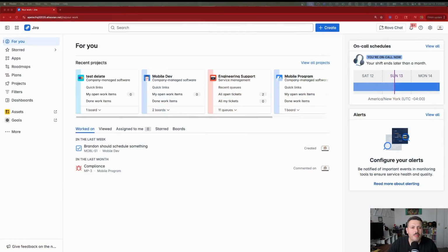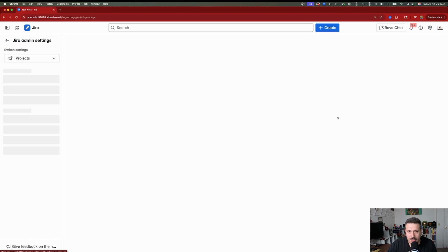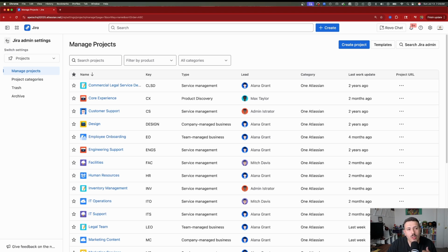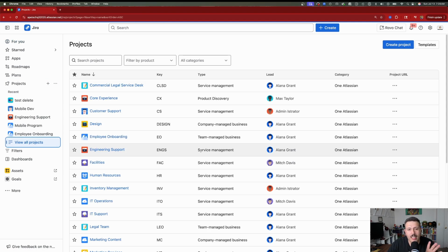But how exactly do we archive a project? Well, let me show you. It's pretty simple, and most videos out there show you how to do it incorrectly. So let me show you the right way. So inside of Jira, what you're going to want to do, especially because you have to be a Jira admin to do this, is you're going to want to click on the gear on the top right corner and then go to projects. Most videos will tell you to go over here on the left-hand side, click on projects, view all projects, and then do it from here.